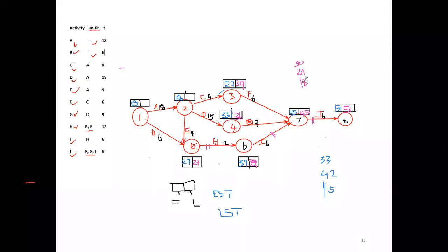Right. Now you see 30, 21, 18. Which is the least one? In the earlier forward calculation, we had to get the highest one, no? Because every activity needs time, so we bring in the highest time. Here we have to bring it to 0, so we select the least one. Remember that. So now 18.